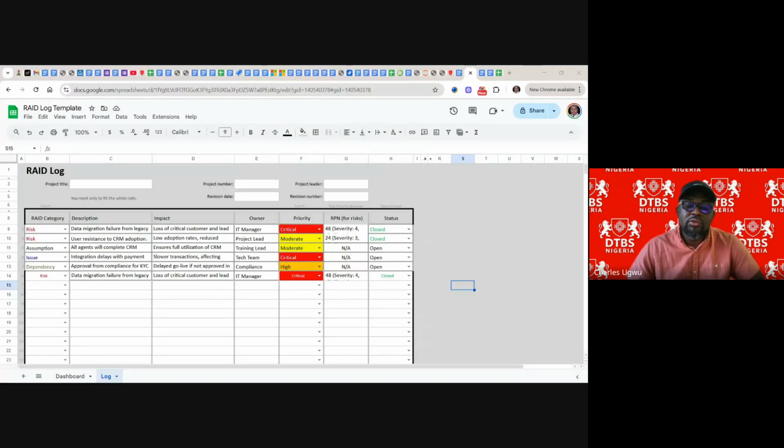In root cause analysis, you keep asking questions: why did this happen? Why, until there is no more why. You can ask up to eight whys until you get down to the root cause of the problem.